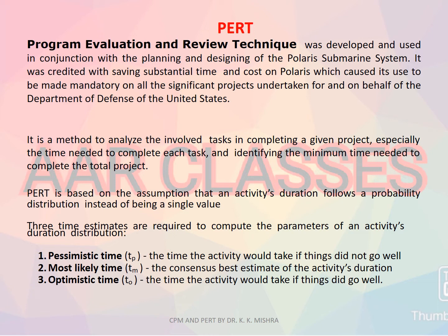Program evaluation and review technique was developed and used in conjunction with the planning and designing of the Polaris submarine system. It was credited with saving substantial time and cost on Polaris, which caused its use to be made mandatory on all the significant projects undertaken for and on behalf of the Department of Defense of the United States. It is a method to analyze the involved tasks in completing a given project, especially the time needed to complete each task and identifying the minimum time needed to complete the total project.